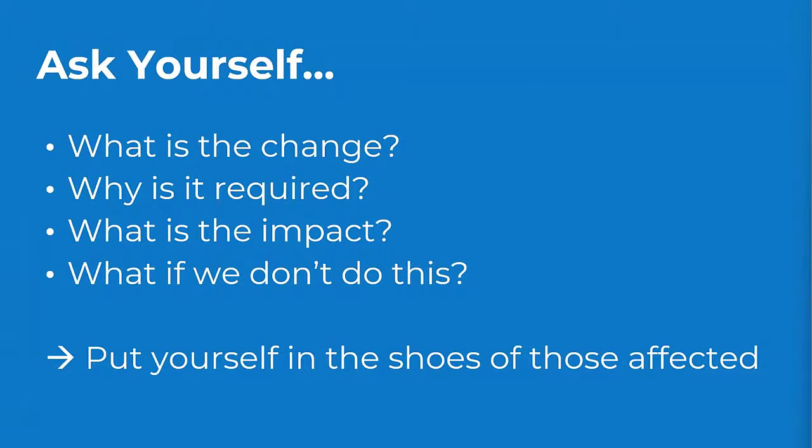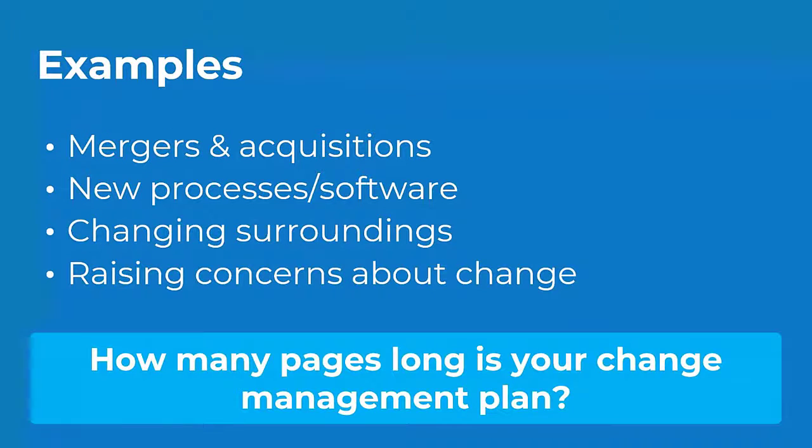Let's not forget, it's also important to consider how people will be supported through the change and after the change. Here, Bouchard recommends communication, training, user guides, and change champions as options for making sure that your changes stick. Let's take a look at a few examples. And I do have another question for you. Okay.